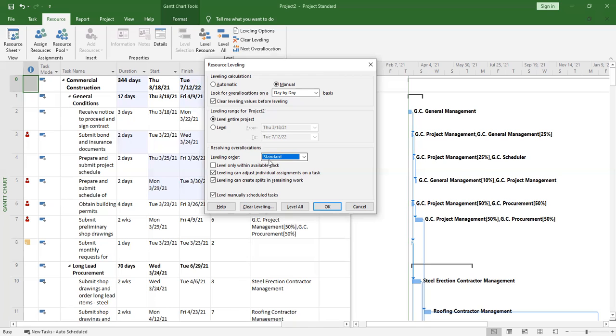That's why you see that critical tasks have 0 slack. What does that mean? It means that for them, never delay them. If you delay them by 1 day, that 1 day will affect the entire project. So those are critical tasks. They have 0 slack, so you never delay them by any single day. Now those are the other options which are there.